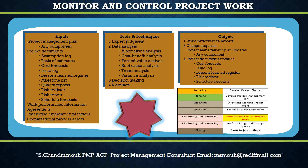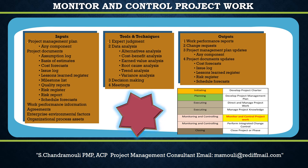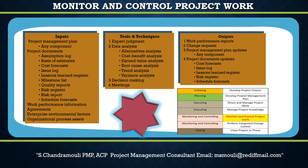The next input is Enterprise Environmental Factors. Enterprise environmental factors that can influence the Monitor and Control Project Work process include but are not limited to: governmental or industry standards (e.g., regulatory agency regulations, codes of conduct, product standards, quality standards, and workmanship standards); organizational work authorization systems; stakeholder risk tolerances; and project management information systems such as scheduling software tools, configuration management systems, and information collection and distribution systems or web interfaces to online automated systems.